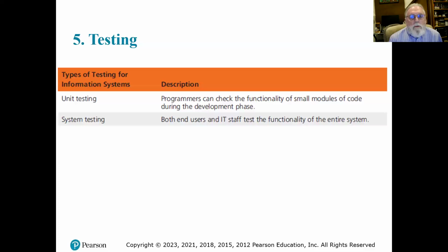And the key here is don't rely on just your IT staff to test the functionality. Get the end users involved in this. And what I did when I implemented a new system for Tyco Electronics, who's a multi-billion-dollar company, I put together a team of testers from throughout the organization. And I gave them a challenge. I offered a reward and said, break it. Find something that doesn't work. Everybody that finds a problem gets a reward.